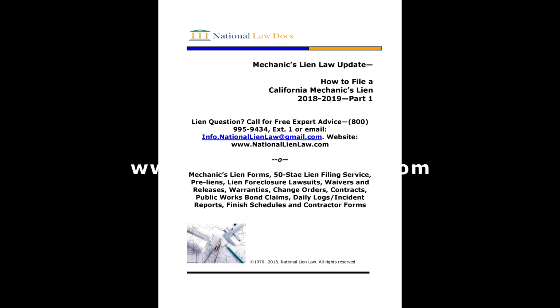As mentioned above as to who may file, it applies generally to contractors and suppliers. As a contractor, however, you have to be currently licensed to file the lien. The California mechanics lien form itself does not require, unlike other states, that you insert your license number in the form, but you are not allowed to collect money or file a lien without the license, and it can be grounds for discipline through the California Contractor State License Board. And the general contractor cannot file a lien for the portion of the work that is subbed out to an unlicensed subcontractor. But the reverse is not the case. Subs and suppliers get a mechanics lien even if their contract is with an unlicensed general.